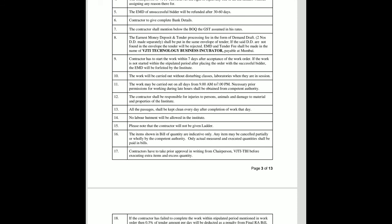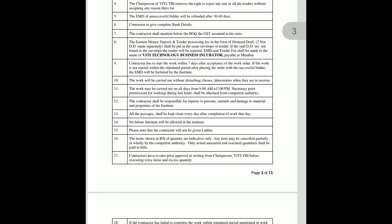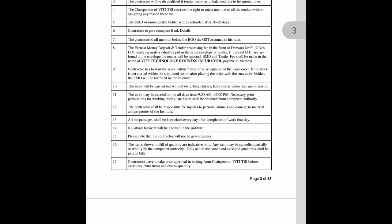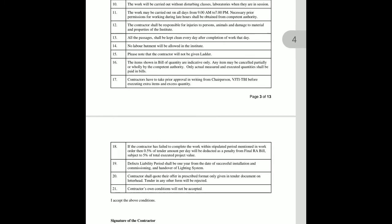The work may be carried out on all days from 9 a.m. to 7 p.m. Necessary prior permission for working during late hours shall be obtained from the competent authority. The contractor shall be responsible for any injury to persons, animals, and damage to materials and properties of the institute. All passages shall be kept clean every day after completion of work. No labour hutment shall be allowed in the institute, and the contractor will not be given a ladder. The items in the bill of quantities are indicative only.